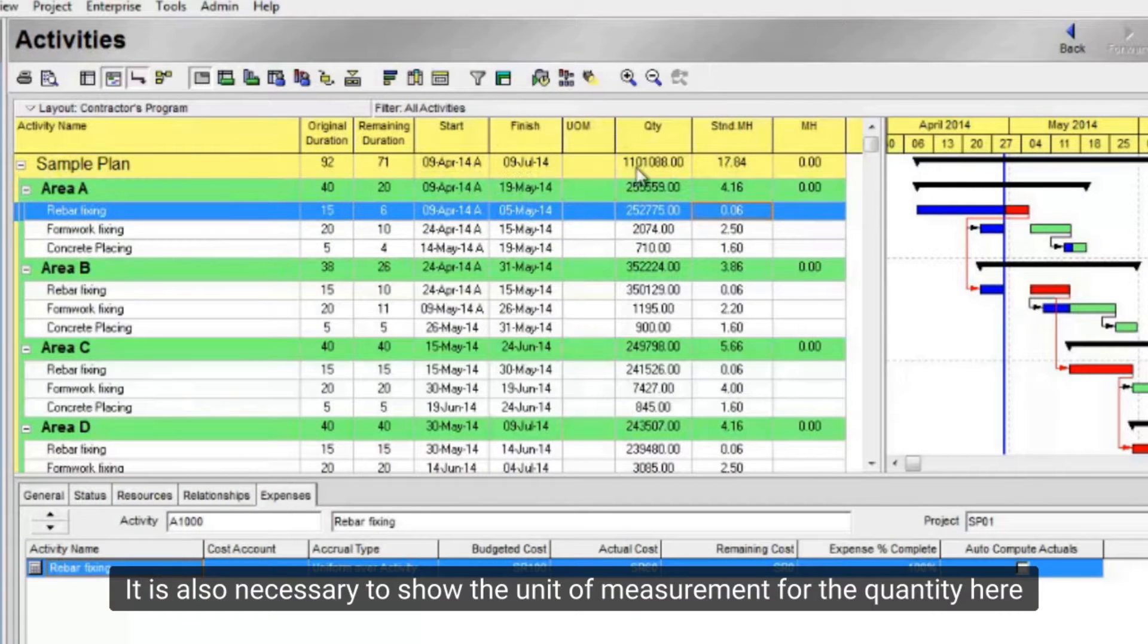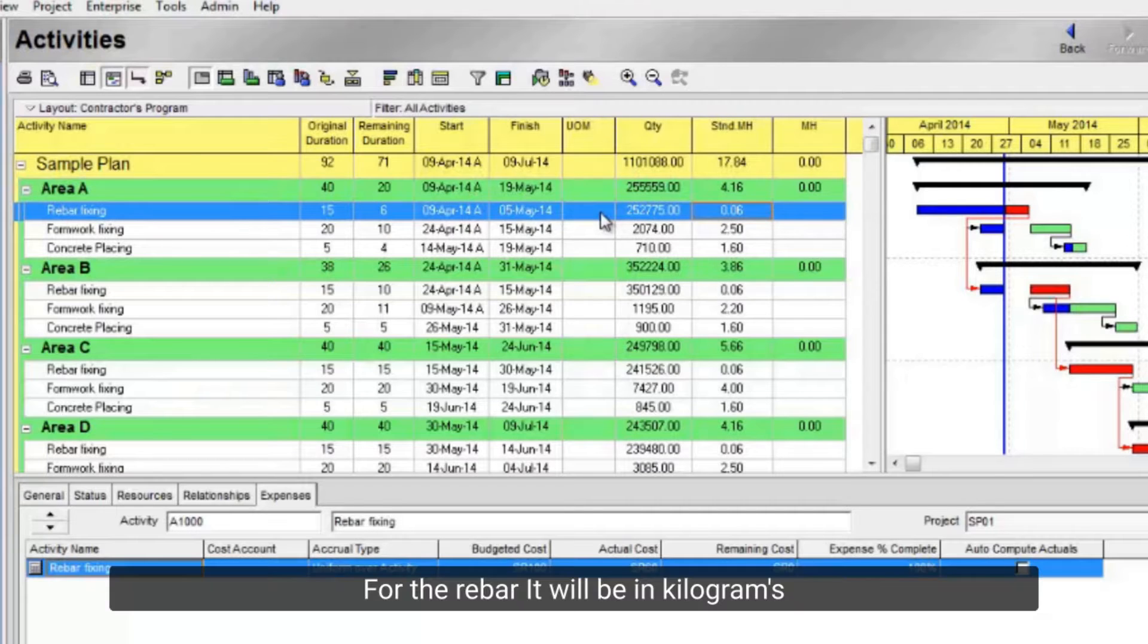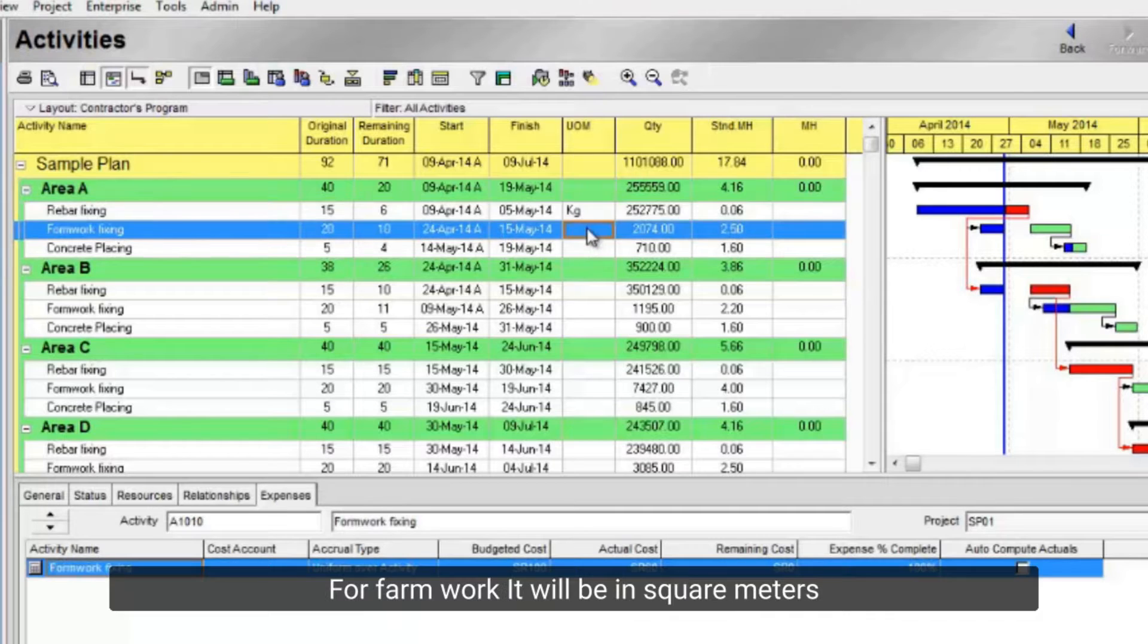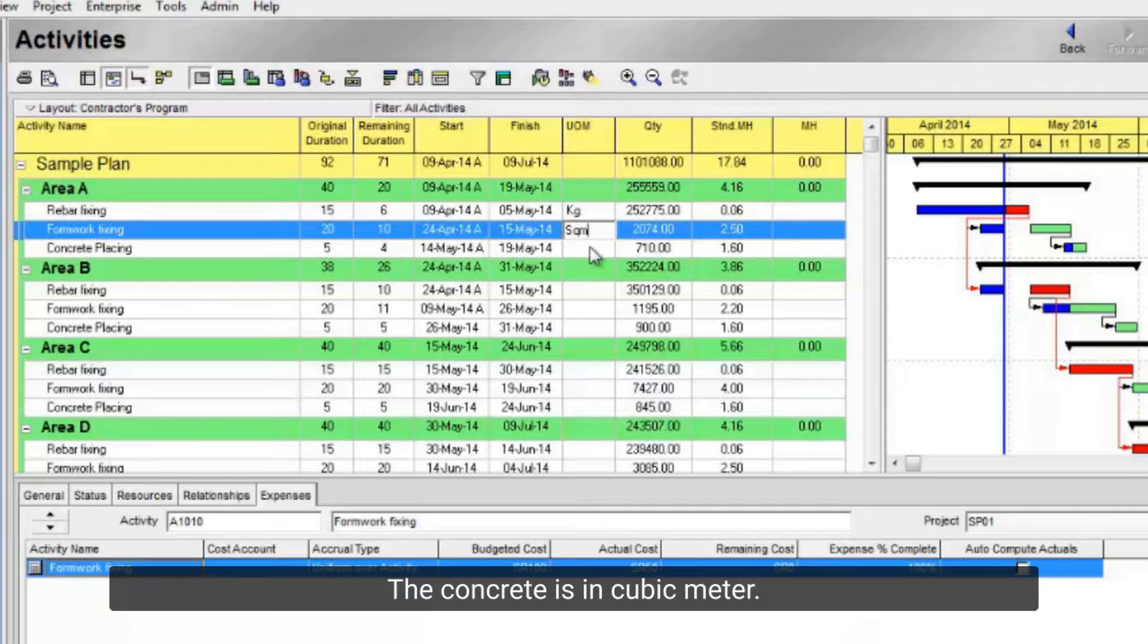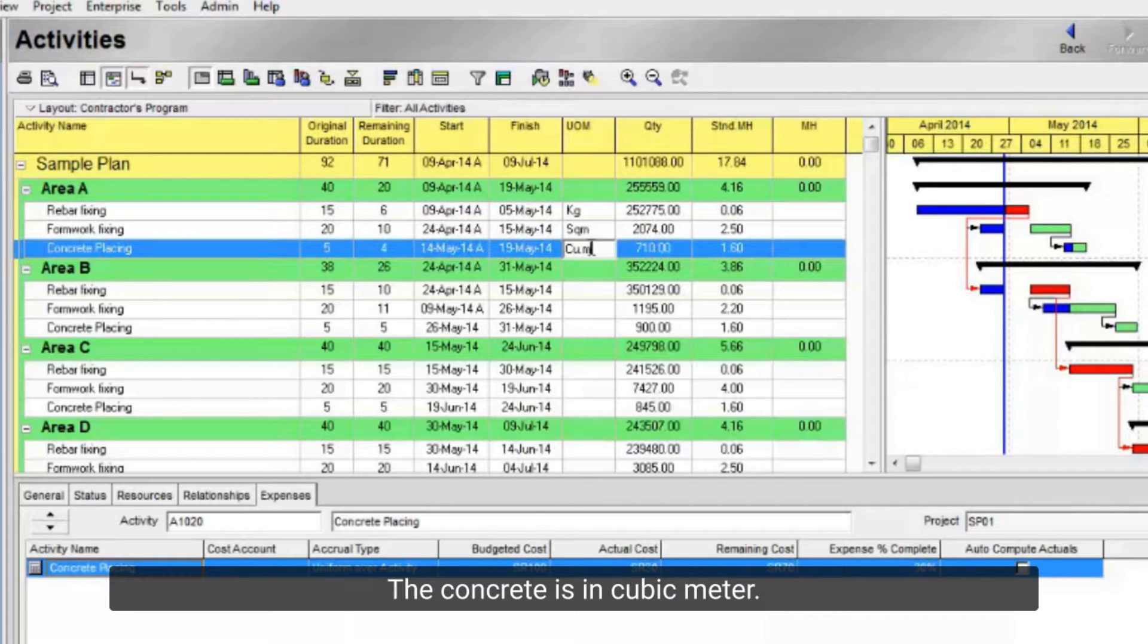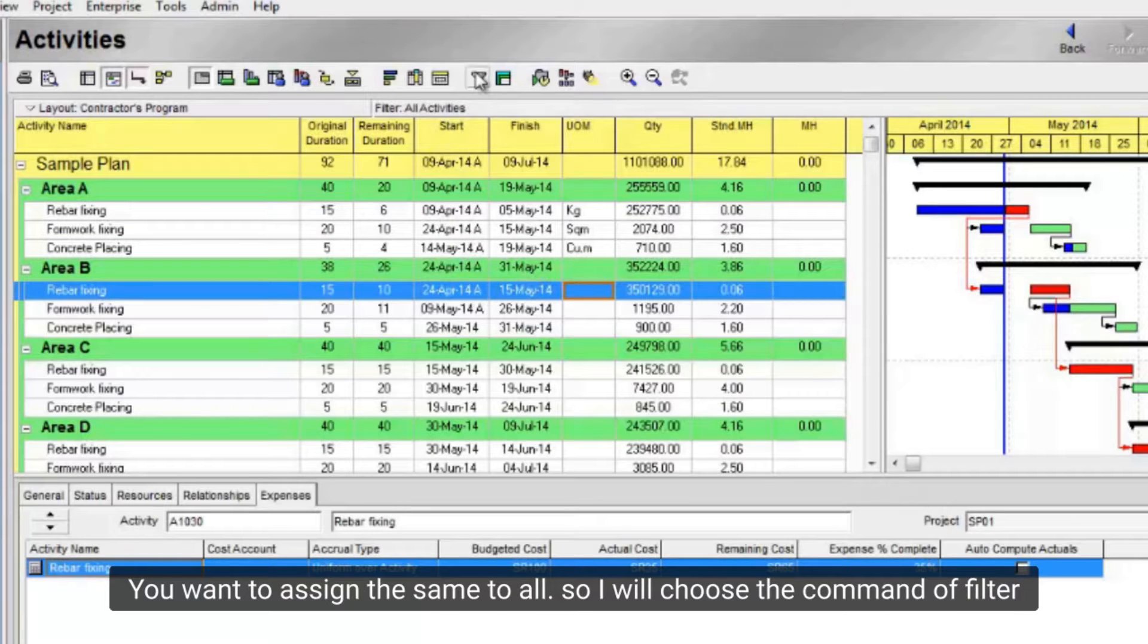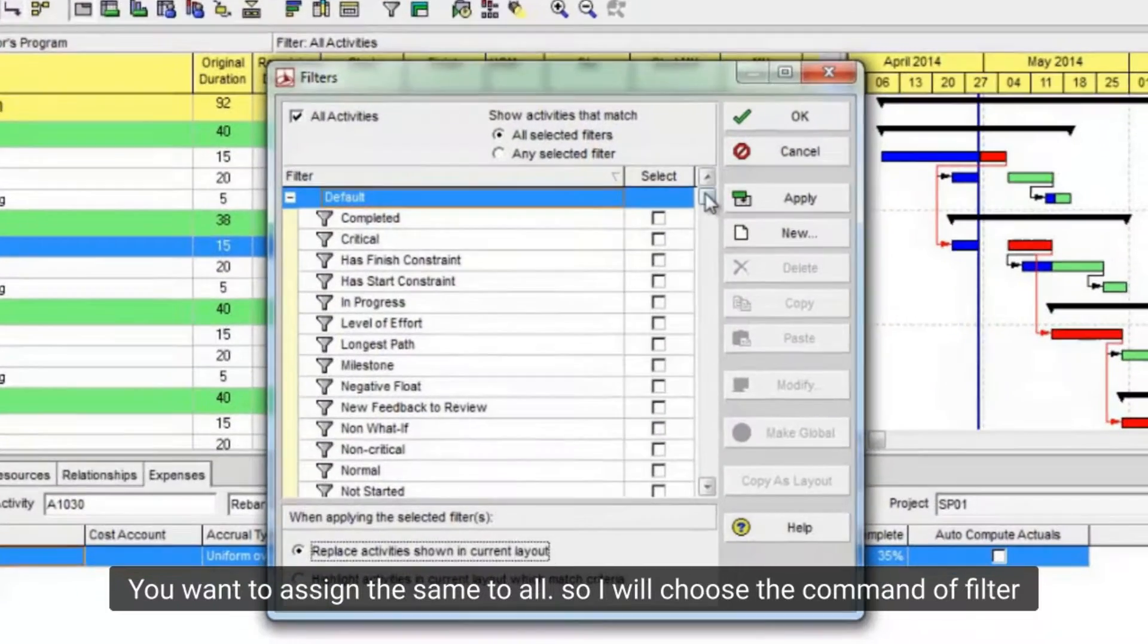It is also necessary to show the unit of measurement for the quantity here. For the rebar it will be in kilograms. For formwork it will be in square meters. The concrete is in cubic meter. You want to assign the same to all.